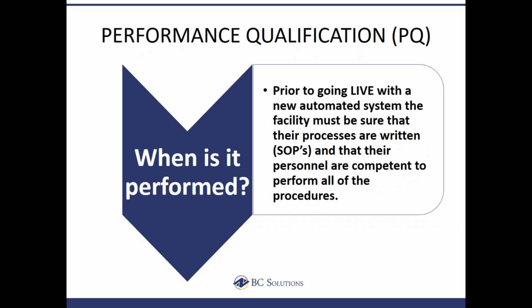And it's always performed right before live. Sometimes people try and do PQ at the same time they're doing OQ. I guess that works, but what I'm always afraid of is that if you train someone to do something and you do PQ with them to make sure they're competent, and then in your OQ something's uncovered that would change the way you have to set up your system, it's always harder to go back to people and say, oh, forget what I told you during that PQ.